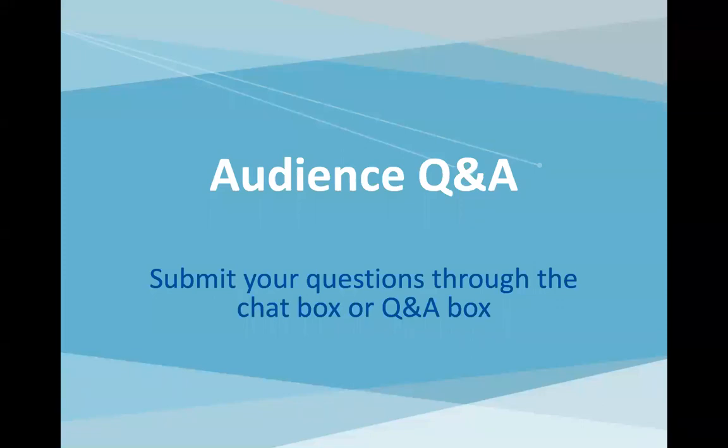This is Chip again. I probably should have mentioned this master clinical trial agreement. The purpose of that was a lot of the back and forth is around things like indemnification, insurance. And so what we tried to arrive at in that particular meeting was compromise language that both sponsors and sites could commonly agree to, and make that a starting point for negotiations to hopefully streamline the process of attorneys taking the strongest differentiating position to defend their respective turf and get to middle ground compromise more quickly.